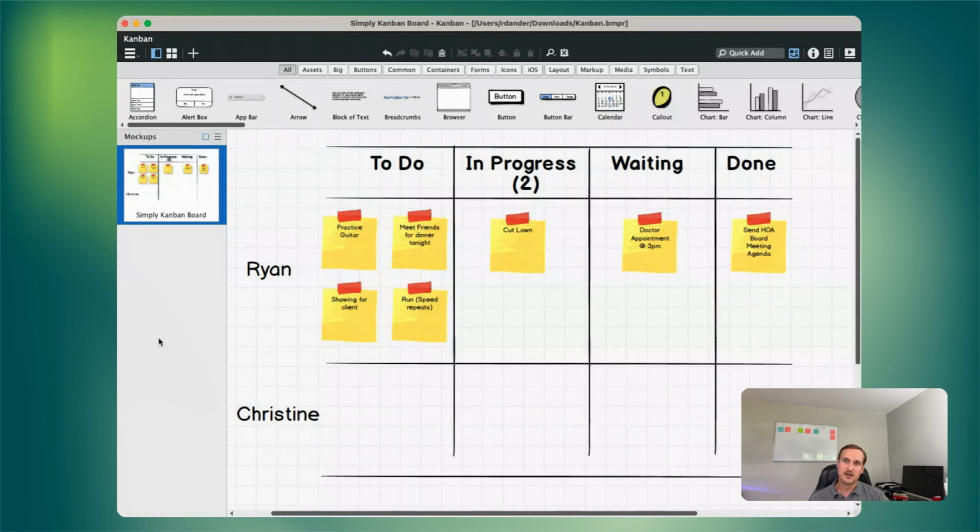Lead time, a lot of times, is more important when you're working with business groups or you're getting requirements from outside customers. The lead time defines when the request was made. So when that customer or business group provided that request, wrote maybe a user story or just provided a written request, and then when was it completed.